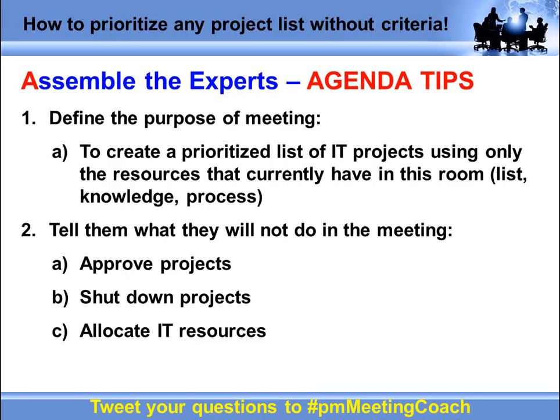In our shop, we may only work on 10, 15, or 20 of those projects a year. So why allocate all of my resources to go through specs and proposals on 200 projects if projects 100 through 200 aren't even going to be touched, okay?